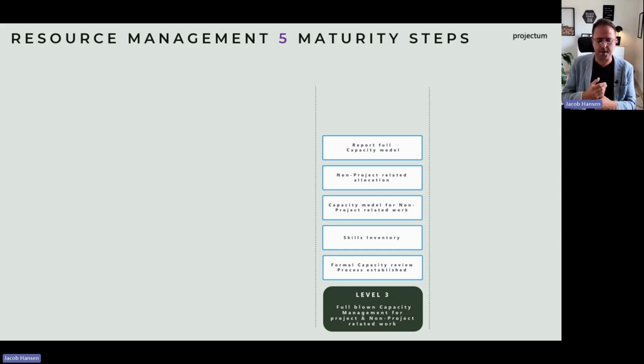So this full capacity model will focus on vacation. We will deduct vacation. Maybe each individual has a calendar. The 4th of July in the US will be closed down, so it will give more or less capacity based on individual calendars. So our capacity model is much more nuanced, and it will actually serve for a more precise picture.